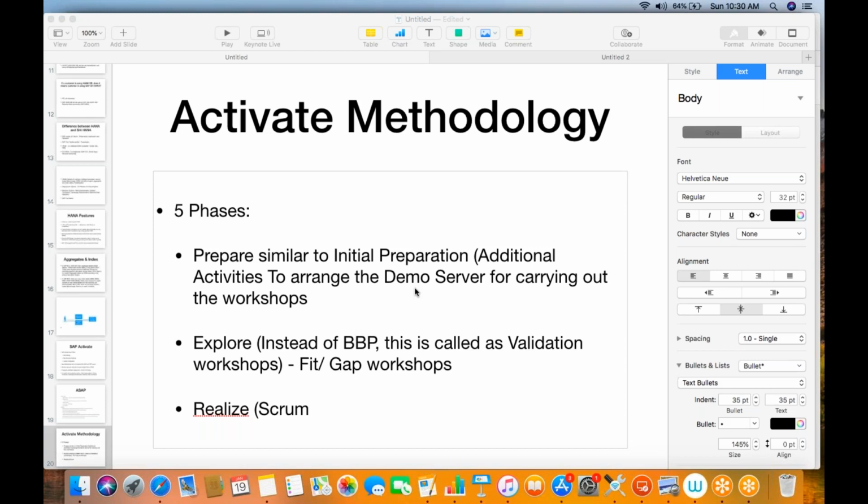So a better approach is Scrum, where we are involving the customers on a day-to-day basis. We are taking regular feedback. We are showing them whatever has been developed. Instead of showing everything after 3 months, we show them whatever you have done on a day-to-day basis. And if they have any feedback, if they want anything to be changed, it is too early.